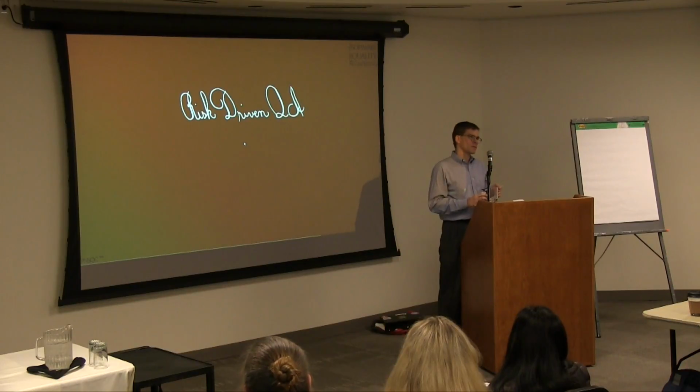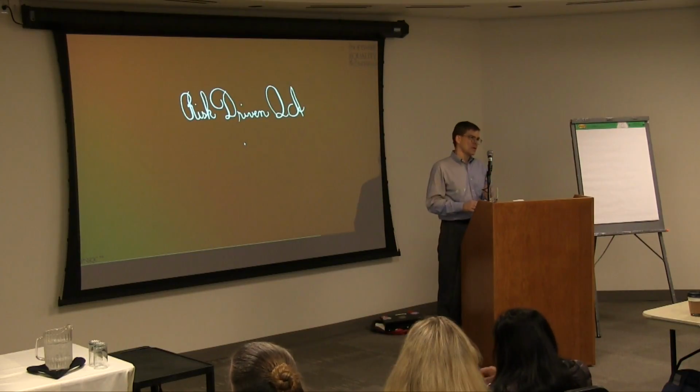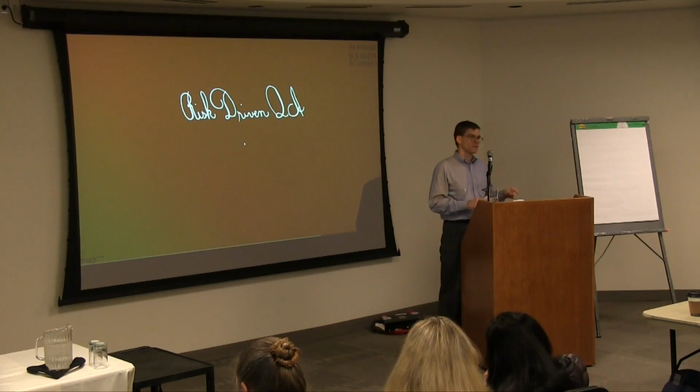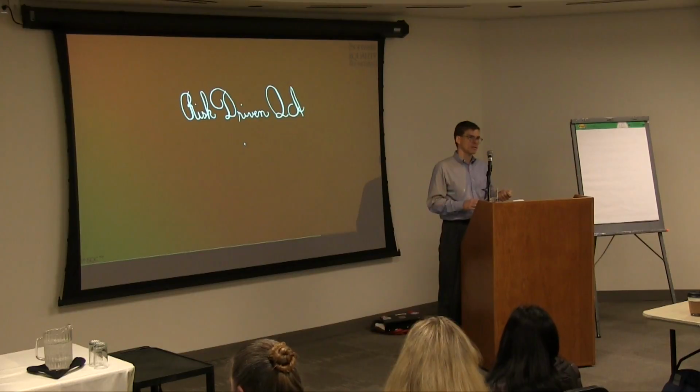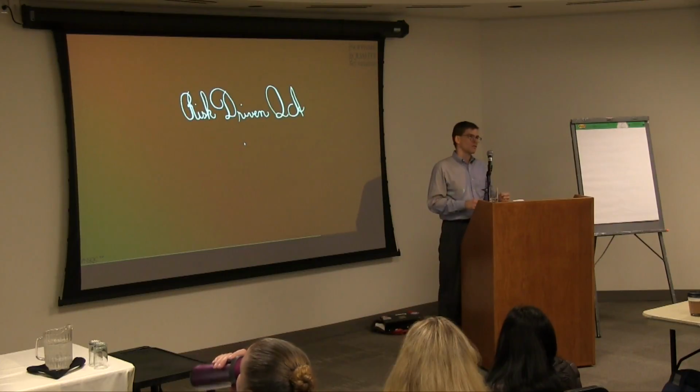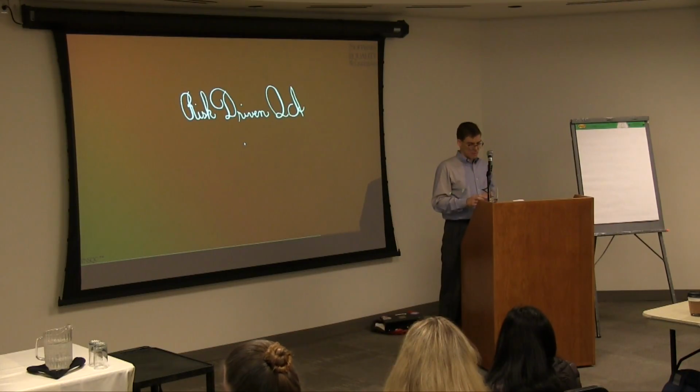In order to do that, we needed an empirical metric to be able to communicate engagement and to be able to measure the impact that the work in flight for the Scrum teams would have on the customer. So we did this by defining an overall customer risk assessment for each and every ticket. They had very coarse metrics. There was high risk, medium risk, low risk. The overall risk assessment was derived from two different risk vectors. The first was a probability vector, which, as you could imagine, was the summation and analysis of how often a customer would be impacted by a particular bug or the introduction of a particular feature. The other vector was severity. What would be the impact to the customer for a given bug or a given new feature?